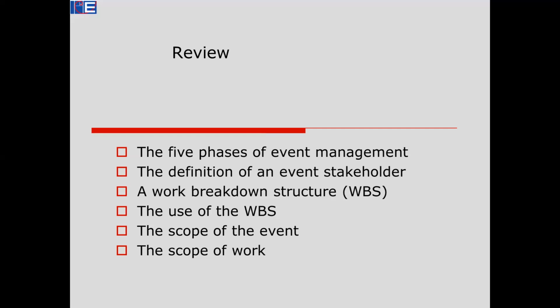Not a lot of event managers use that term. That doesn't matter. They use the technique or the process. There is no doubt about it. How that's used, we've gone through that. We've looked at the scope of the event, and we've looked at scope of work. The scope of the event is the size of the event, how many people, how long it goes for. Now, the scope of work is the amount of work that you need to do to deliver that event and shut it down. So they're 2 different things, but they're highly related.